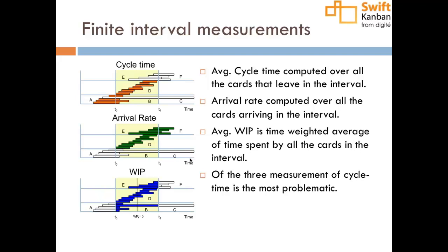So when we take cycle time averages or plot cycle time series over short intervals, one needs to be cognizant of the fact that occasionally you will get a spike, and the spike results from some long-standing intangible work being completed. So you need to track the cycle time, but also be flexible enough not to suddenly get alarmed and make changes for what turns out to be an artifact of the measurement.